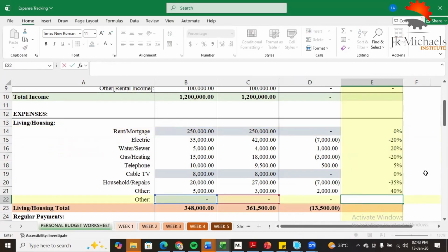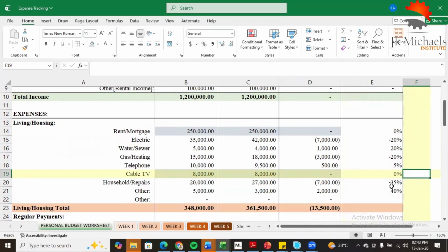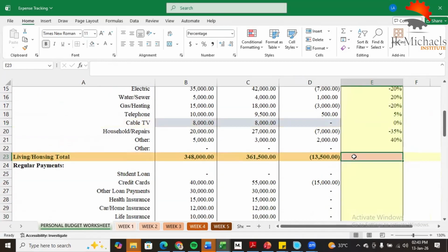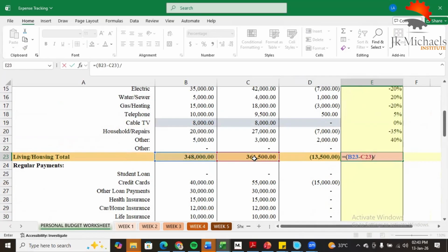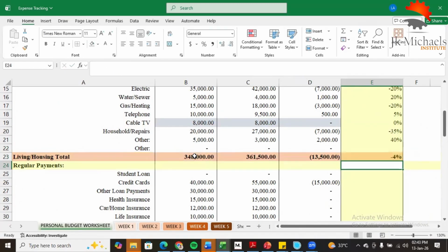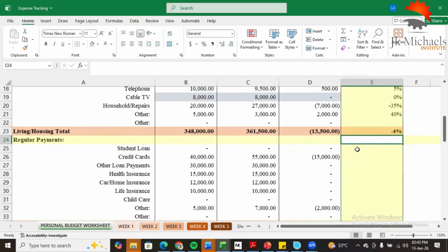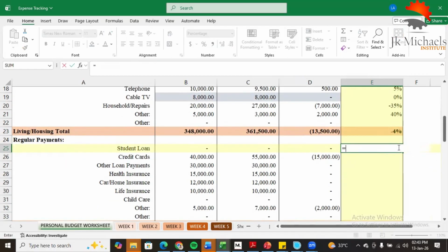Okay. So you see, right, we were behind. So this is the percentage at which we superseded our budget. Well, in this case, we can simply repeat the formula: budget minus actual over the budget, right? Generally, we had a 4% variance, right? Let's repeat that here.